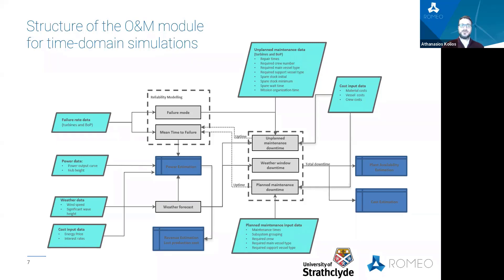The maintenance module covers planned and unplanned maintenance activities, and takes into account the actual duration of all stages required to perform the repair and maintenance operations, using vessel and crew day rates, along with material costs, to estimate the total O&M costs. Other outputs of the model are the time-based and production-based availability in the power production process.